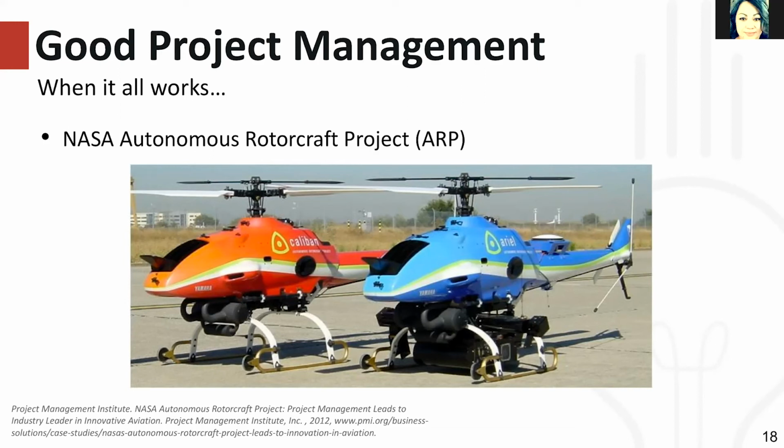So the project manager started out by defining the scope and then presenting it to all the stakeholders, and then negotiating the needs of the project team with the other stakeholders so that they could come to a final agreement on the scope.